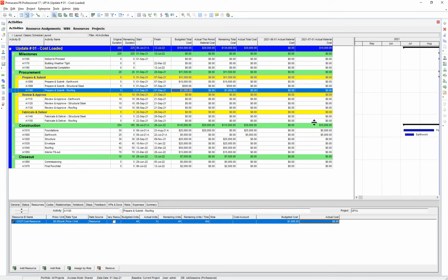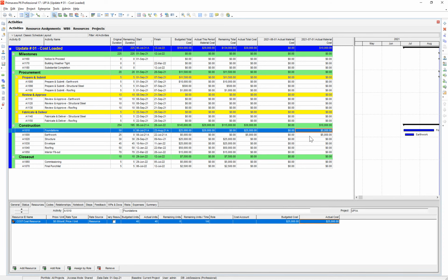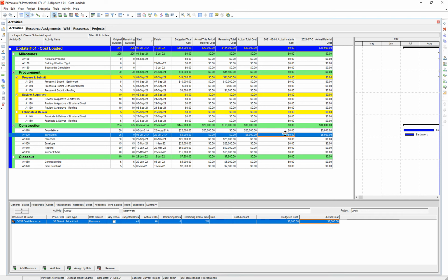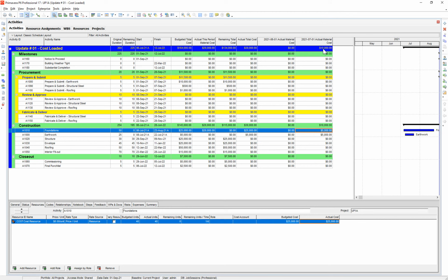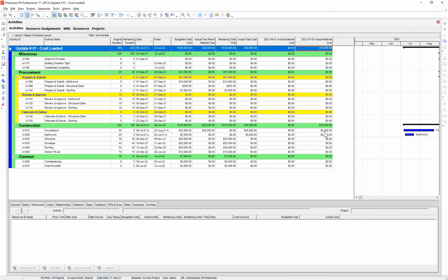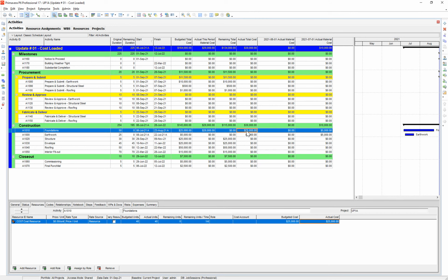So here's what we see. We see the previous stored value from June was 0 because we didn't store any values from there. And the previous value from July totals $10,000 because that was the previous stored period performance. So the calculation for actual total cost is this period cost plus the cumulative cost of all financial periods. So this cost is looking at how much did you bill this period, and then how much did you bill in all the previous periods combined.